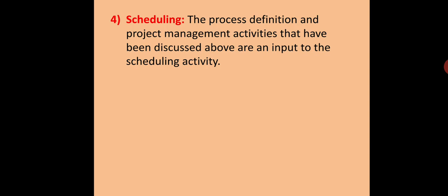Now, all the human resources which are available, people working on the project, then looking into the effort estimates, and by having the information of risk analysis, you can find out which tasks are interdependent, which tasks can run parallelly, which tasks need to be executed first, and which tasks need to be executed last. So based on this, timelines can be constructed in a given project schedule.